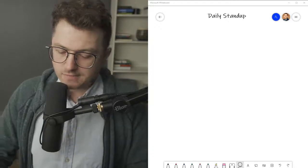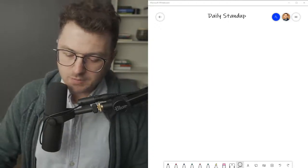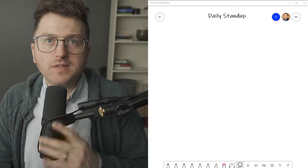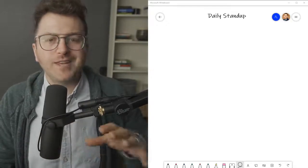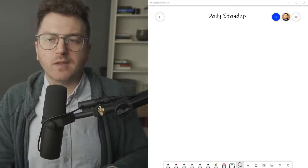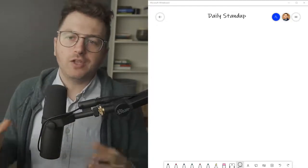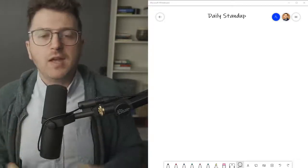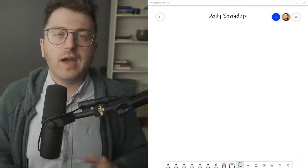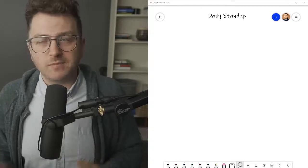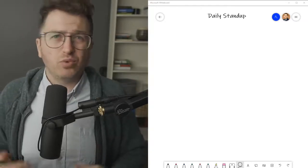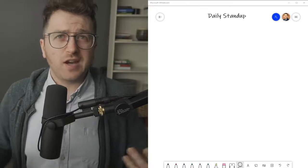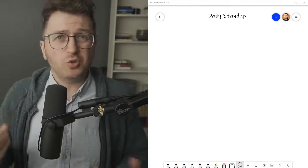So what is a daily stand-up all about? Mainly, a daily stand-up is a meeting that should be about 10 minutes long, and it should contain all the development team. If the development team is under about seven people, that's fine. If they're more than that, it should be broken into two different teams. The rule of thumb says you have to be able to feed the entire team with two pizzas.